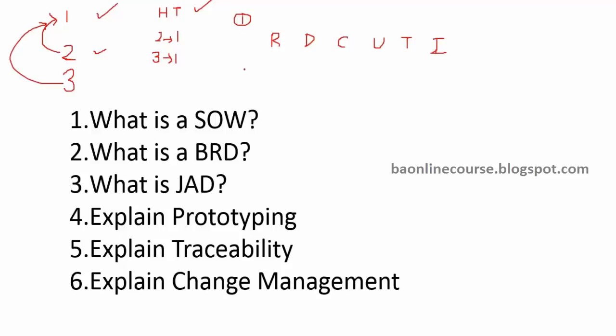Each requirement, you're tracking them. So requirement 1 is there, and then that is linked to the design document of 1, which is in turn linked to the program which is implementing that requirement. Then the unit test cases which are testing that one, then the functional test cases, and finally the implemented software.